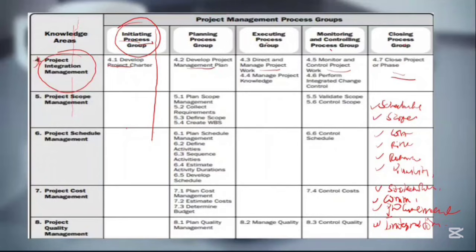And in some organizations, the charter would be written by the sponsor or somebody above the project manager, even without the involvement of the project manager. So when you walk in, the charter is fait accompli, it's done. So they hand the charter to you, and you will take your time to go through to understand exactly what you have to do. High level, it's not detailed. They are telling you the project summary budget is about $1 million. But it's your job to take your time and break the work down to check whether the 1 million stated in the charter would be enough for the project.